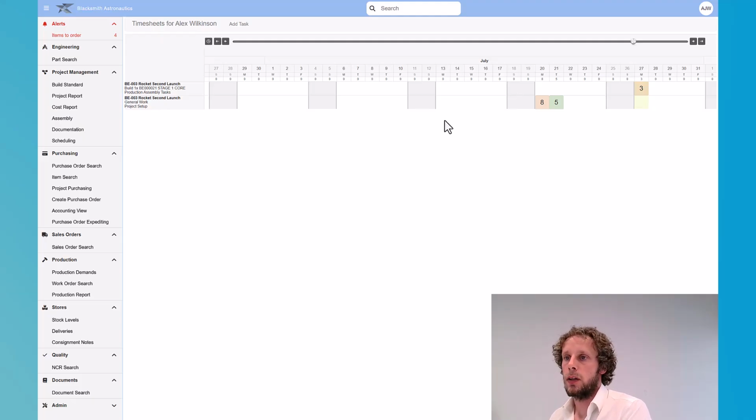And this provides a convenient list of all recent tasks that a user has been working on, and so they can easily update for last week or the current day, and provides a quick and easy interface for gathering this information. The hours are allocated to specific activities underneath the project so that we can capture fine-grained detail about where time has been spent.